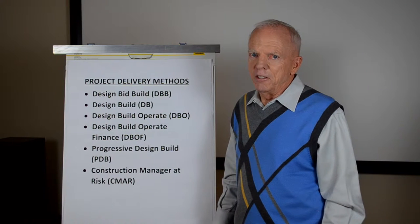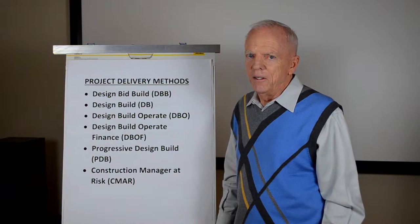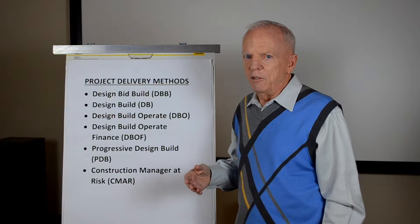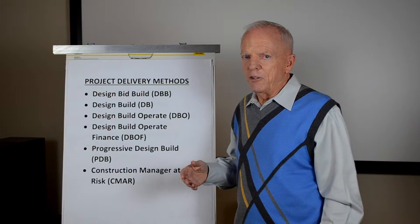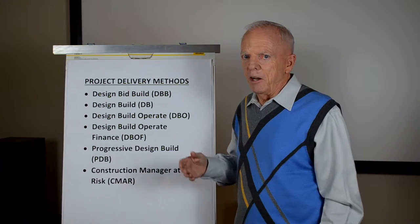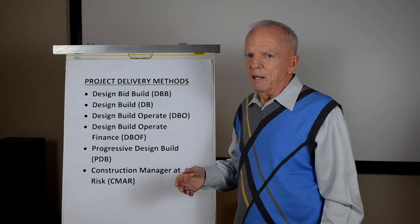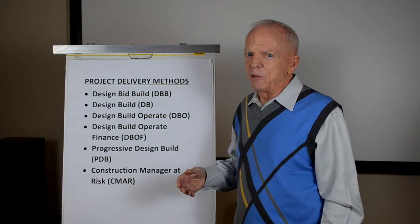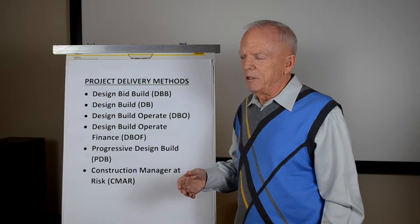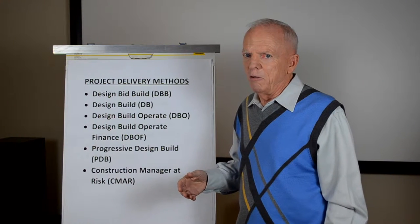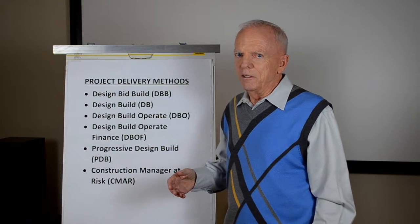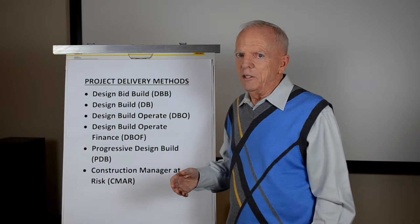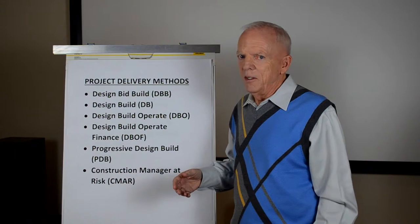An engineer is hired to design the project, produces the design documents that are used for bidding, contractors bid on it, and the low bidder gets the job. Owners get a little frustrated with this approach at times because working with the low bidder is not always a very comfortable situation. There may be cost creep and schedule creep.